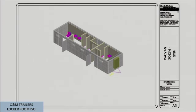In the discussions that staff had, these are not considered temporary, which is why they're going through the site plan review process. Understand that they will be removed in a certain amount of time, but anything that lasts this long, especially with a foundation, is not considered temporary for our regulating purposes. So that's why it's before you.